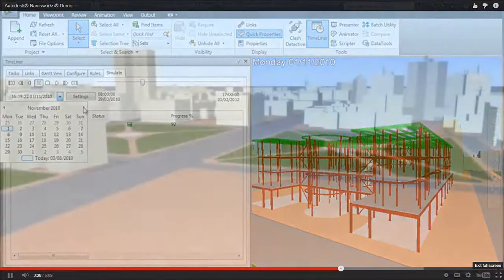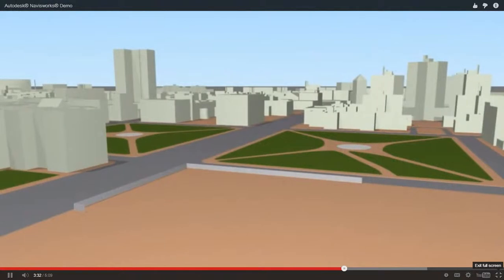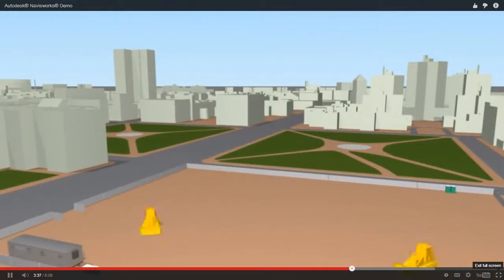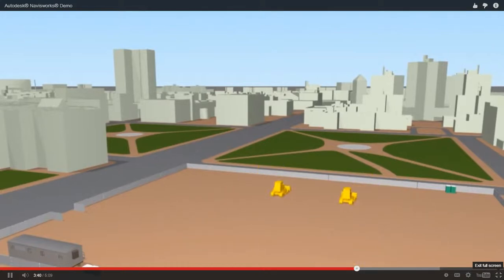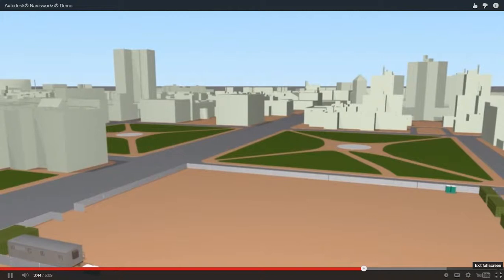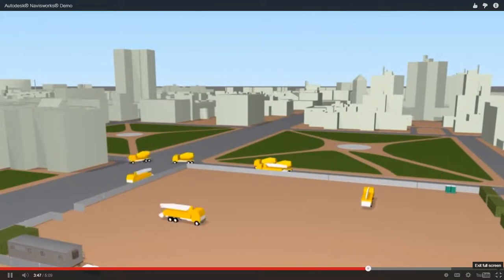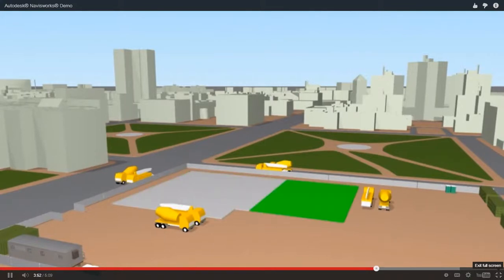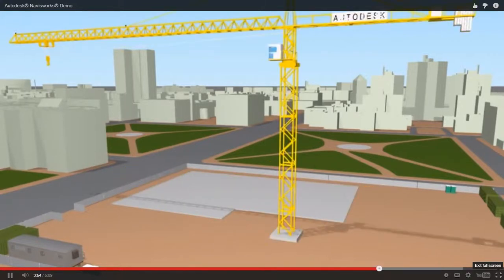This type of analysis can be further augmented to include logistic simulations, creating mock-up scenarios of construction sites to assist in planning and visualizing areas of potential risk. For example, finding optimum positions for site cranes, and ensuring adequate clearance with surrounding buildings, topography, or temporary structures such as scaffolding.